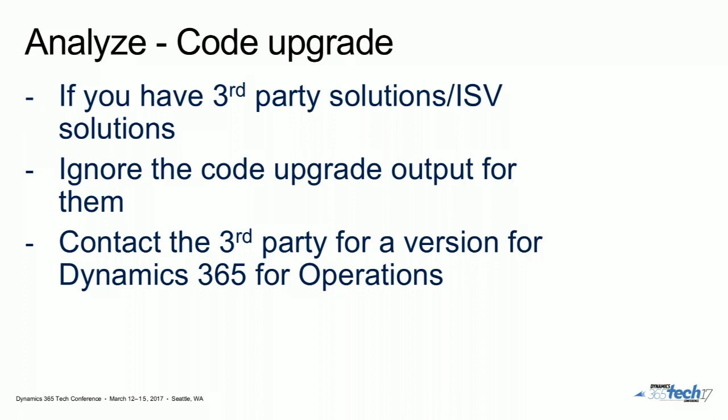And then when it does build, functionality has changed because I've commented out code that's supposed to work. Without going off on a massive tangent, it's really not worth it. It's much, much better in the long run. Even if you do all those things, when you do get the version of their solution back, you have to reverse everything you did, which wastes a bunch of time again. It was way more productive to just get the version of their solution up front, get it in there, and then deal with your stuff after that.